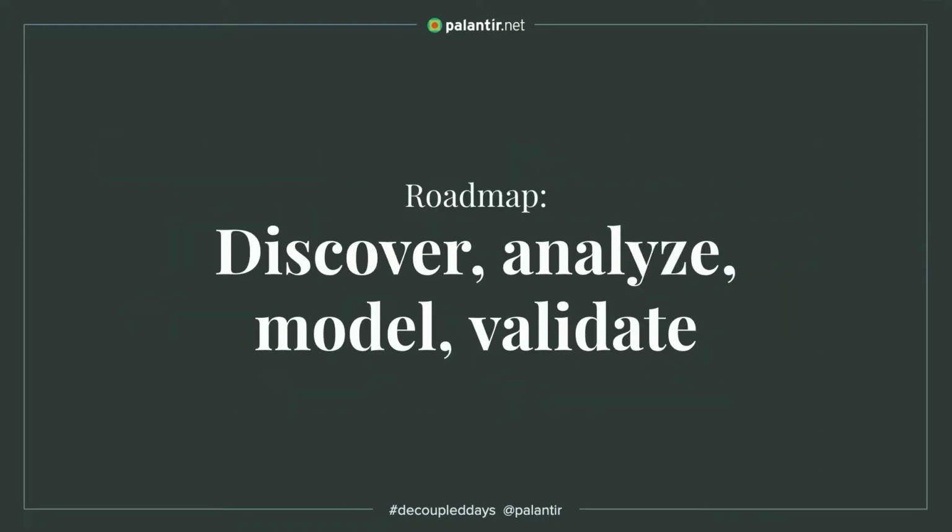So our structure roughly for what we did was we said, okay, we're going to spend time, and these weren't concrete segments, but basically we're going to focus on discovery at the beginning of the engagement, where we learn about the organization and their current systems. We're going to analyze all that information and talk to them about it. Then we'll build a model, and then we'll validate that model with them.